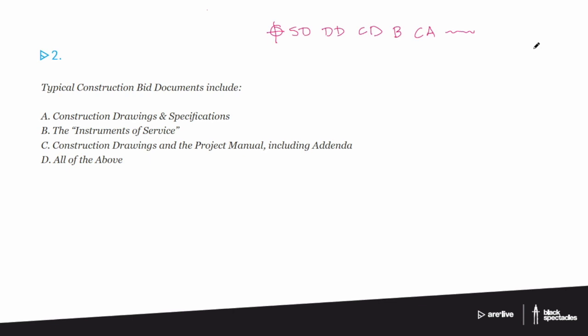So that SD phase, the concept there is big picture, bold ideas, how's the overall thing going to work, and then you'd get a sign-off at the end of that from the owner. And part of putting that together is you did a sort of general idea of how much space you can build because of the budget. You're gonna do another cost estimate, still very generalized cost estimate, but you're gonna do another one at SD because you want to make sure that you haven't let it slip and get bigger or creep and become a project that isn't going to be doable by the owner because there's no reason to keep going on a project if they can't afford it.